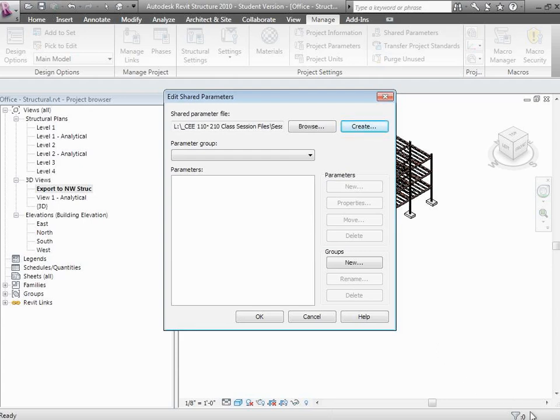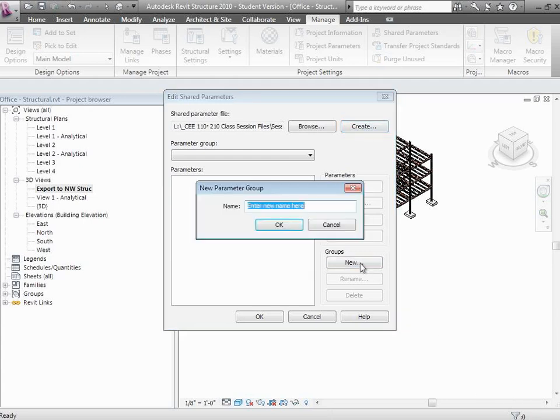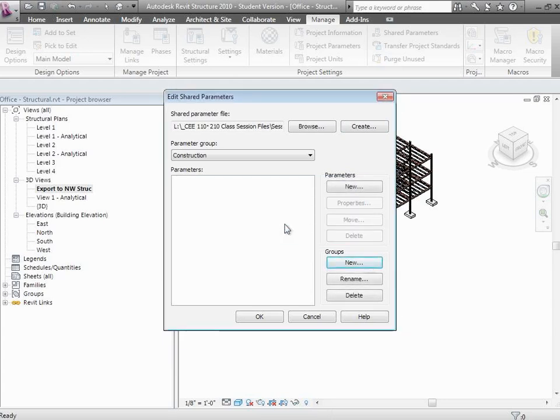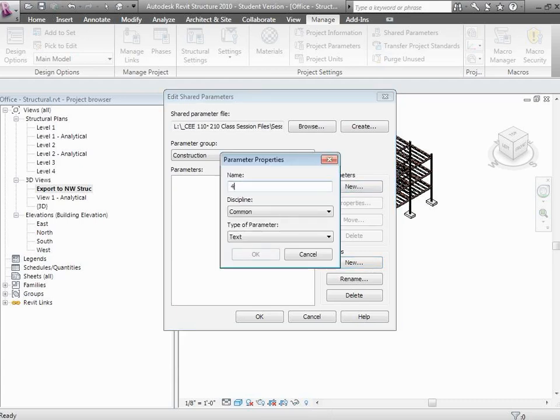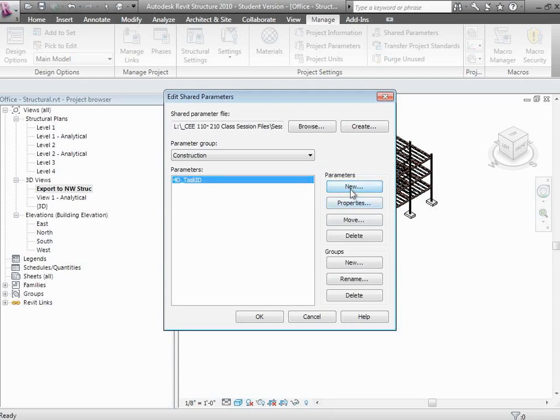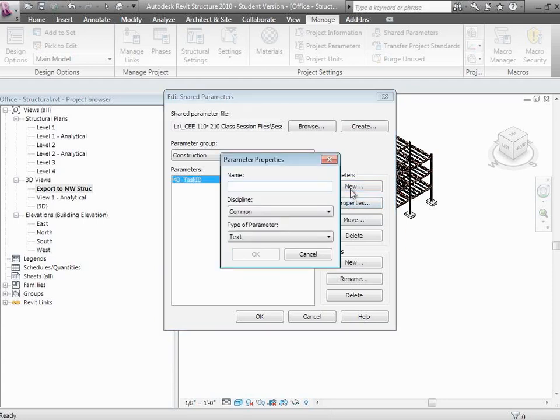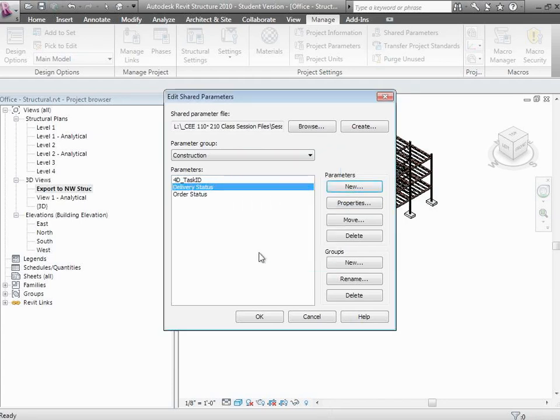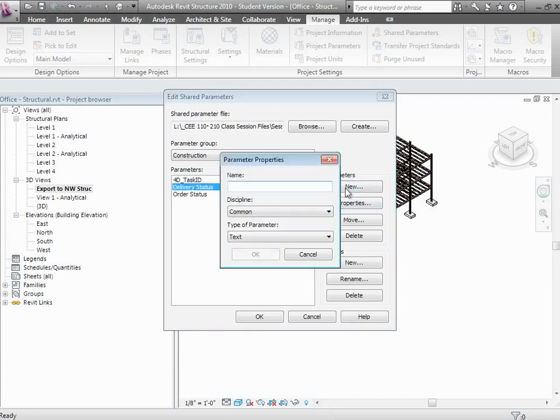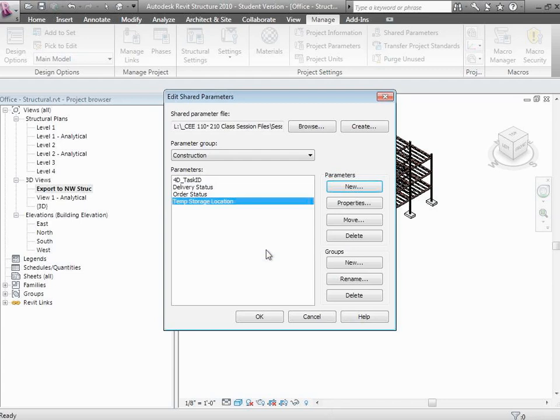There are groupings and then specific parameters we want to add. I'm going to add a group of parameters, a group I'll call Construction. That's just an overall heading. Then I'll add one specific parameter to the construction group called 4DTaskID. You can add as many as you want. I can add Order Status, which will be a text field. I can add Delivery Status. I can add one called Temporary Storage Location. So as material comes in on site, we can keep track of where it's located on its way to being installed. I can add as much data as I like.